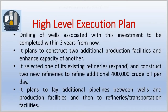The high-level execution plan to achieve the future investment includes: drilling new wells; constructing two new production facilities and enhancing the capacity of one existing production facility; expanding the capacity of one existing refinery and constructing two new refineries; and laying additional pipelines between wells and production facilities, production facilities and refineries, refineries and transportation facilities, and production facilities and transportation facilities.